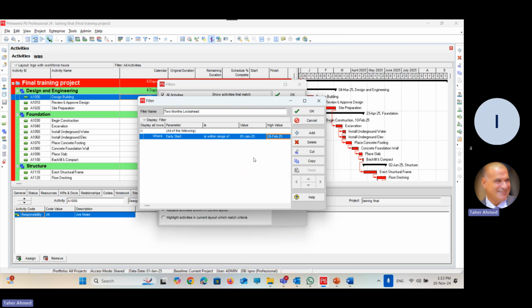Those dates represent 2 months or not? Okay. The date I select represents 2 months in the project or not? Yes, but it's a very bad way to select the information. Why? Because it will only view the activity during those dates. It's better not to use custom dates.